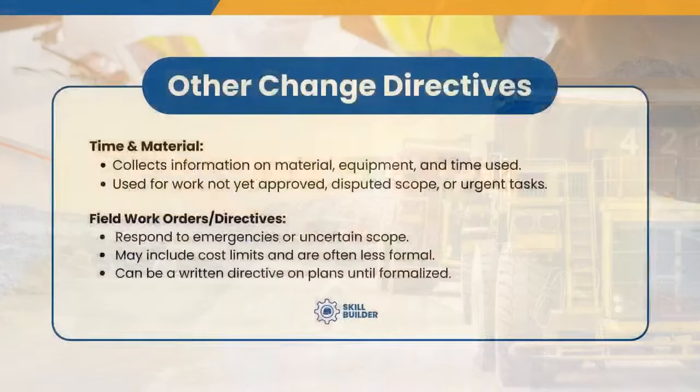This is difficult because a lot of times this is the old school handshake. Yes, we all agree. I personally don't like to do it that way, and make sure that we at least identify on the project as-built that there has been an order to proceed but not exceed, and that we all sign and initial the scope of work for that particular part of the work that's being given a field directive. Then, construction managers, you go back to the trailer and you send off an email, or you send off a field work directive at that moment explaining the scope of work, the responsibilities, and the expectations and boundaries of it, so that when the cost comes in, it's very clear what is going to fall within that particular field directive.